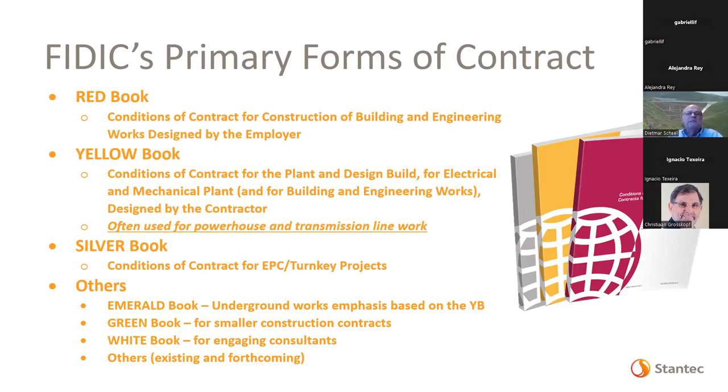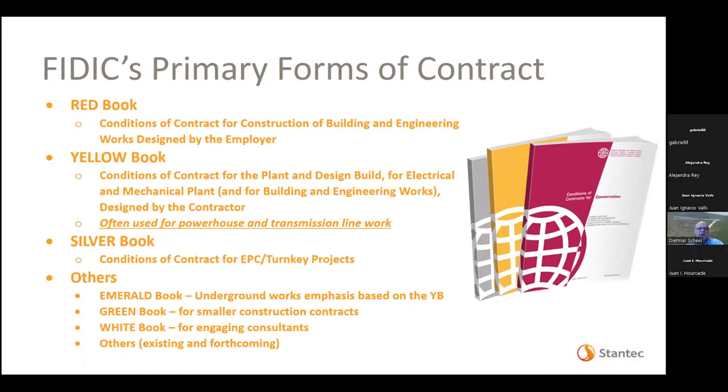There's enough differences between underground works and powerhouse works where you need condition assessments and that sort of thing that will reduce your risk. And there's a lot more planning and contingency planning you can do with electromechanical work than there is with tunneling work. Tunneling work, you're bound to hit much more major surprises.